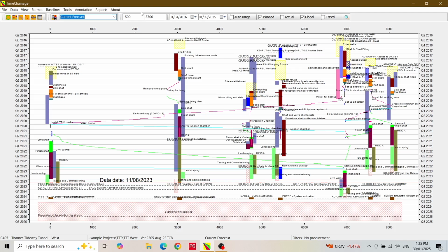Normally, it would make sense to start by opening an existing layout that needs the least amount of effort to create the new one. But for this demonstration, speed isn't important, so we will start from the layout that we happen to have open. For any new layout, we will want to show certain activities, formatted in a particular way and set with a specific date and chainage range. We might also want to include a baseline, actual progress, specific annotation, or even some graphics.